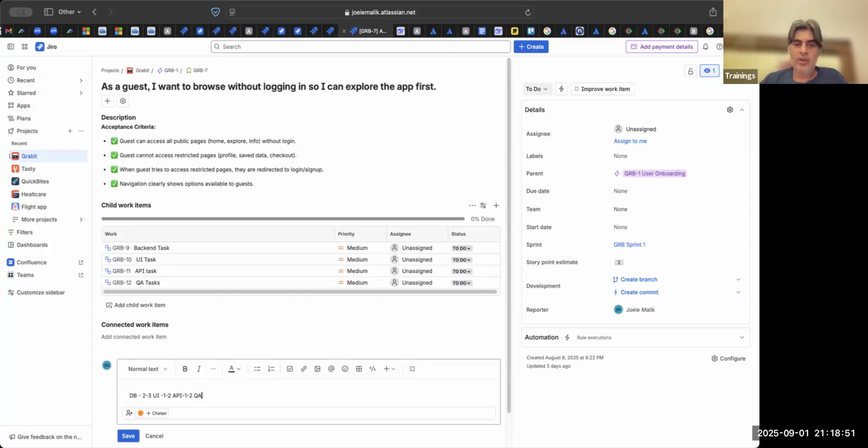Then QA, you are the QA. It's a simple browsing story. How many hours? You can say 5 hours also. I'll not debate. Don't worry. You can say 5 hours also. Let us say 5. So again, if there are 3 QAs, you can have a discussion. If there is only one QA, then you have to go by what he says and then see in the retrospective whether that actually happens, how many hours it actually took. So you can find out the number of hours.